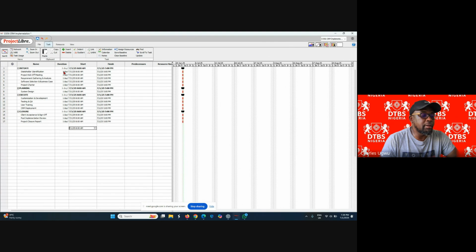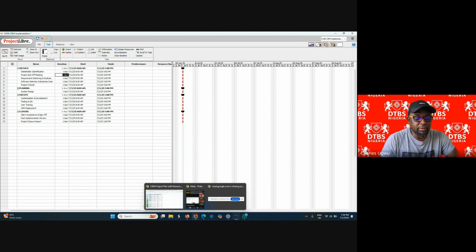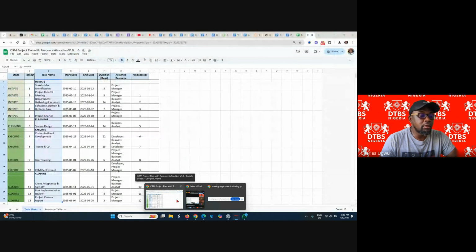Okay, let's start assigning number of days. How many days? I don't know how many of you are following, but for identifying stakeholders and their expectations, we say it's 3 days, project kickoff 2 days, and requirement gathering 14 days.